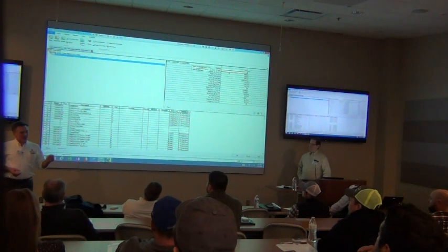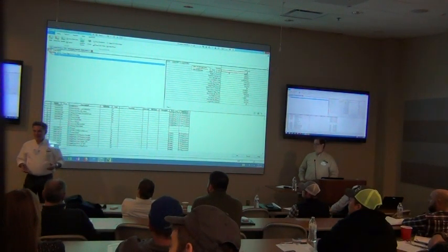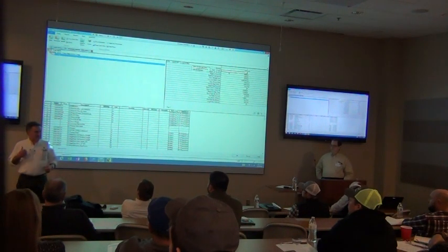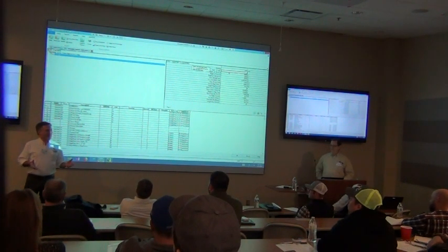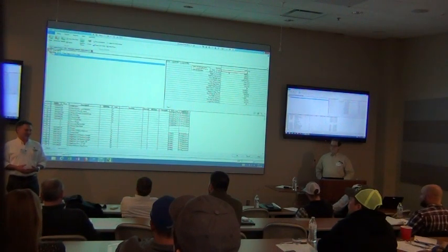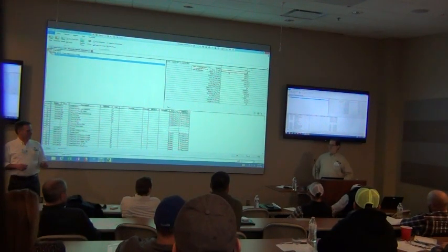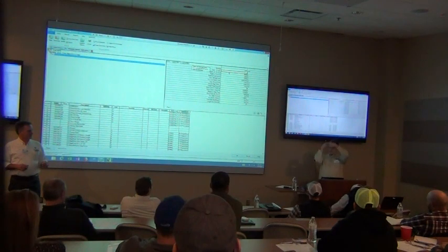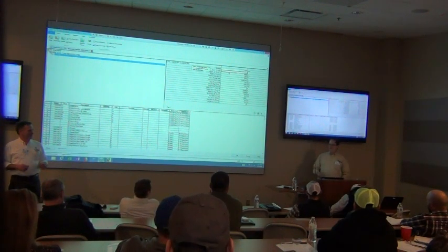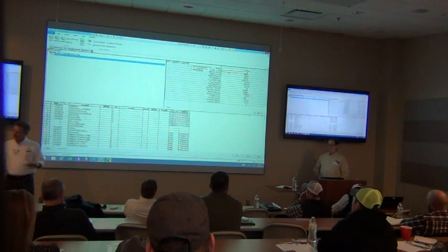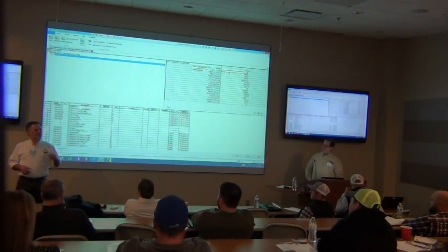Assemblies are a safeguard to make sure we're getting the quantities we need for an accurate estimate. I've had people say, 'I'm not sure I want an accurate estimate.' They said, 'A lot of times I get a job because I forgot something — with this, I won't forget anything.' The guy was literally worried about not getting work because he wouldn't forget anything. We had one who came back and showed how his estimate was consistently 10% higher than his hand takeoff, because it listed out everything he needed. My point is: if we get everything in there accurately, you can choose what you want to forget.